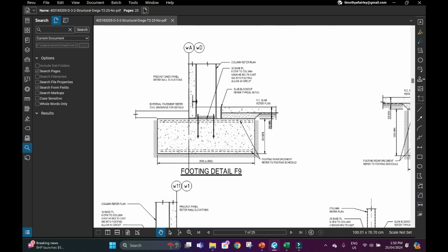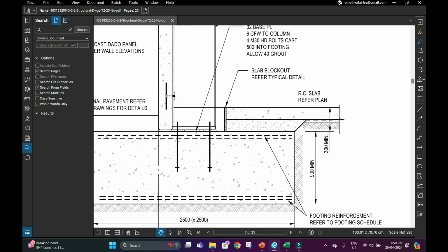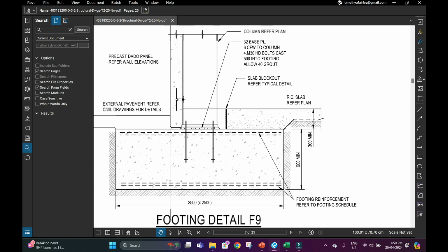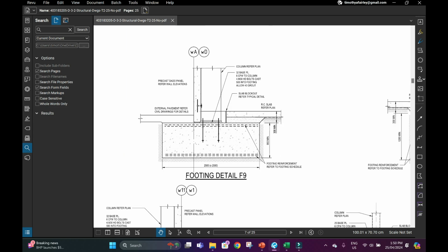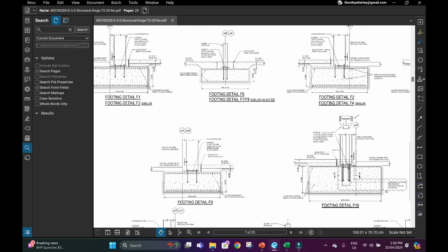So there's some detailed version of the footings, and you can see there's all these steel columns and piers that fix to this, and there's also blockouts around the piers. So this is when we start to refine the project scope and go through this in detail. This will be important when we create our work breakdown structure, but also document our assumptions.